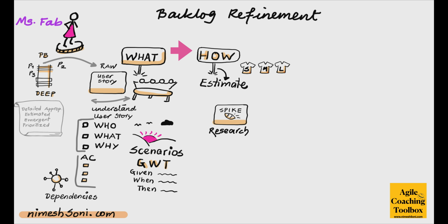Let's say the team was able to come to a consensus and the team marked the story as a large effort. Now, if it is a large effort, I would ask the team to stay on this story and move into the next stage, and that being slicing. So we want the team to slice this story, the large story, into multiple smaller chunks. And the reasoning is that if it is a large story, the team may not be able to complete that entire story within a sprint.